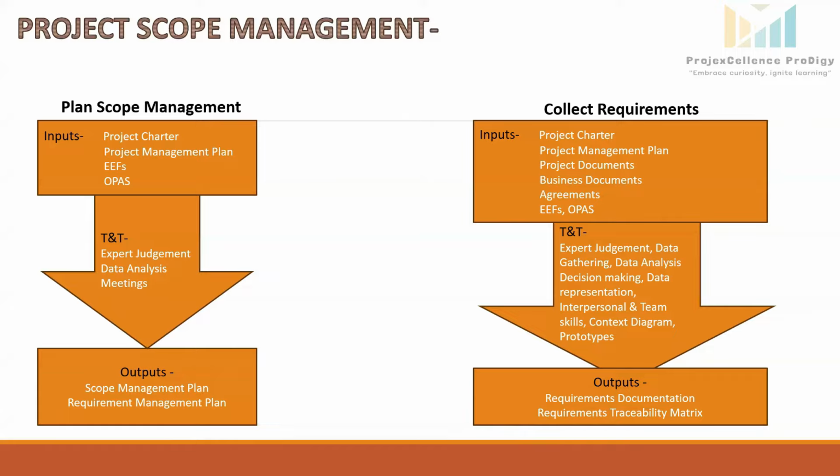Next, you decide how important each factor is by giving it a weight. For example, if cost is very important, you might give it a high weight like 10. If quality is less important, you might give it a weight of 5. Now for each option, you rate how well it performs on each factor.